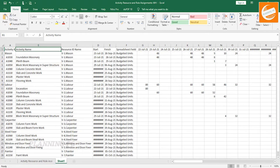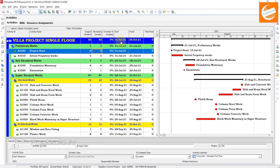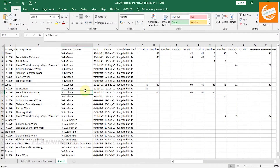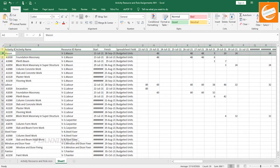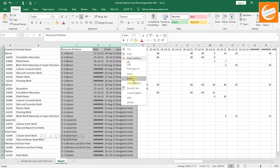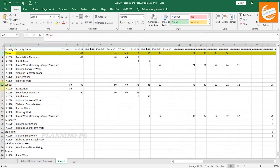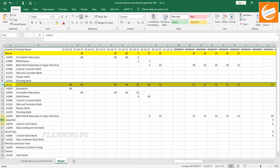First, we can see the project start date is 15th of July and the finish date is 6th of October. There are two methods to view the data: one is by resource — if you have assigned resources like mason labor — or if you have assigned only manhours instead of individual resources. If you don't need the resource columns, just hide these three columns or delete them. These rows are cumulative totals for the activities listed below.